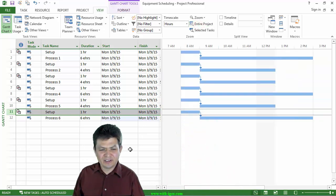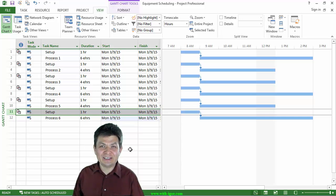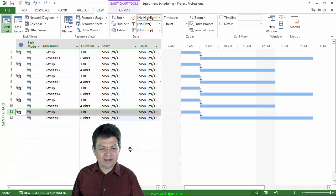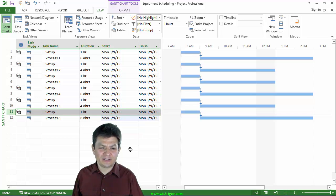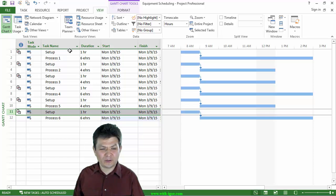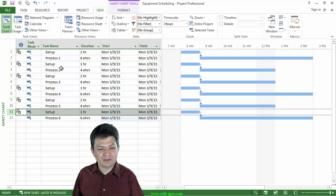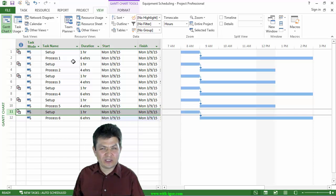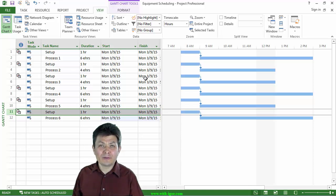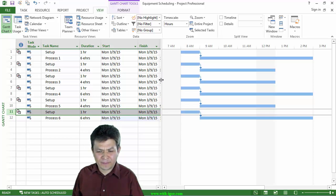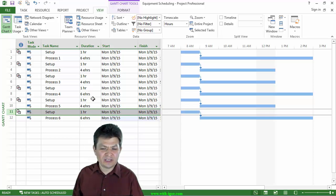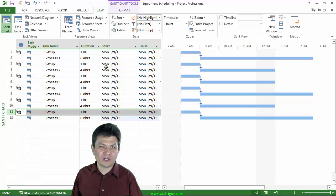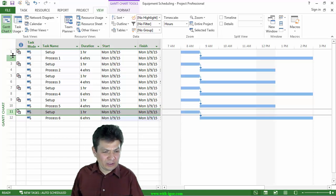Now let me take a look at the entire project. Now I have a bunch of tasks. Each one of the processes is preceded, is linked to a predecessor called setup. Now the setup is using the project calendar. So the setup cannot take place outside of the project calendar, outside of the business hours. But each one of the processes can run being elapsed duration tasks and based on 24-hour calendar. They can run at any time.